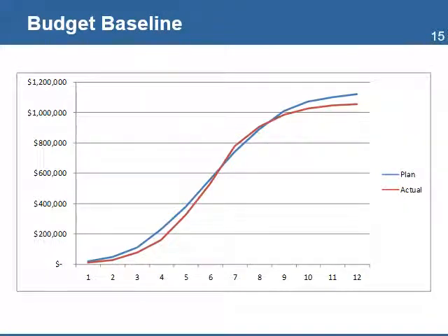Once the project budget has been reviewed and approved, the next step is to create a budget baseline. The baseline is a time-phased budget that project managers use to measure and monitor budget performance. The approved cost baseline consists of the cost estimates for the individual activities over the life of the project. The project expenditures or actual costs are measured against this baseline as the project makes progress.